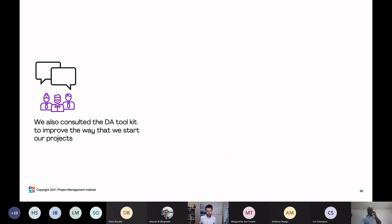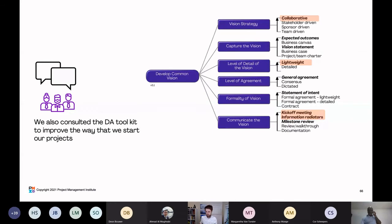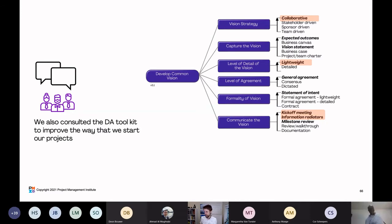The team also consulted the DA toolkit to improve the way they start their projects — developing a common vision. Before starting to build something, you need agreement between the team and key stakeholders on what you're building, roughly how long it will take, who's involved, and the high-level risks. They referenced the DA toolkit and went from something very stakeholder-driven and heavily detailed — which was slowing them down — to something collaborative, lightweight, and including information radiators to visually display what they're building.